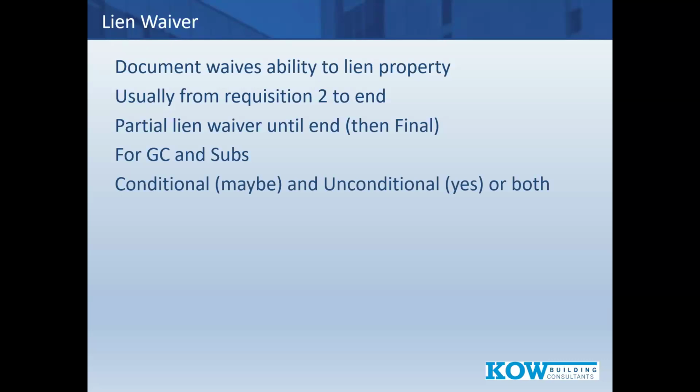So let's say you have a project that has been paid $1 million a month after retainage. And today is month 9. So through month 8, they were paid $8 million. The unconditional dollar value in the partial waiver of lien is the $8 million amount. It's done, it's paid, it's history. You'll then see $1 million in the conditional amount, meaning it's a condition on them getting funded for this month. And then those two numbers together give you the total funding picture. So that's how conditional and unconditional work on a lien waiver.